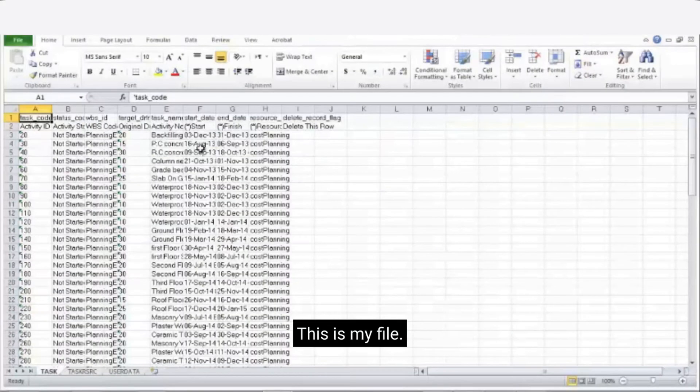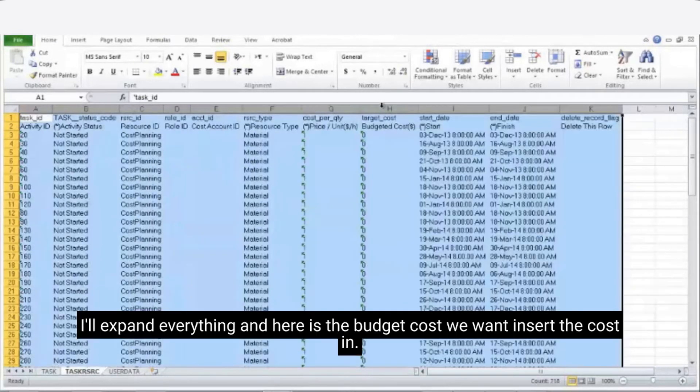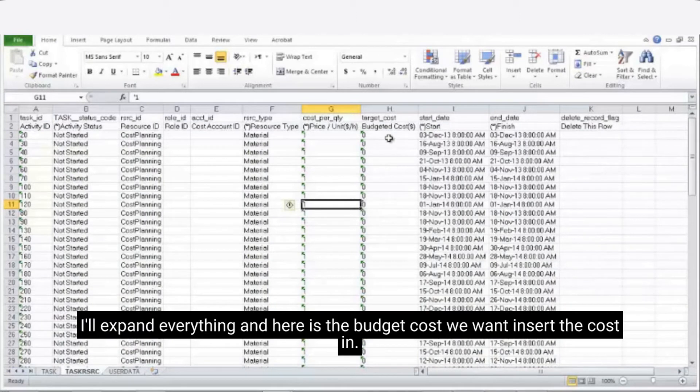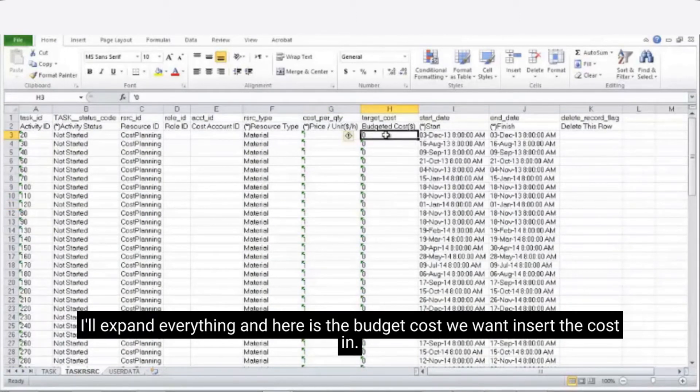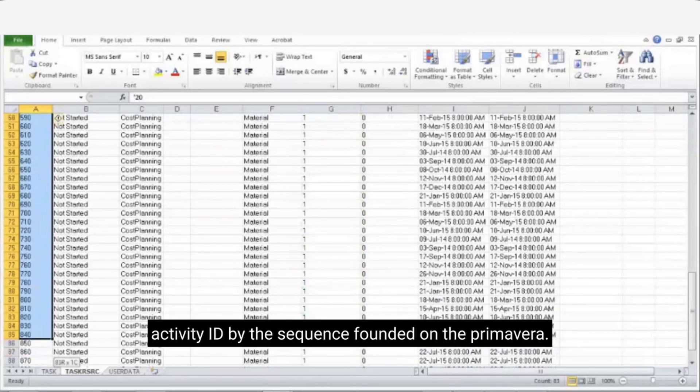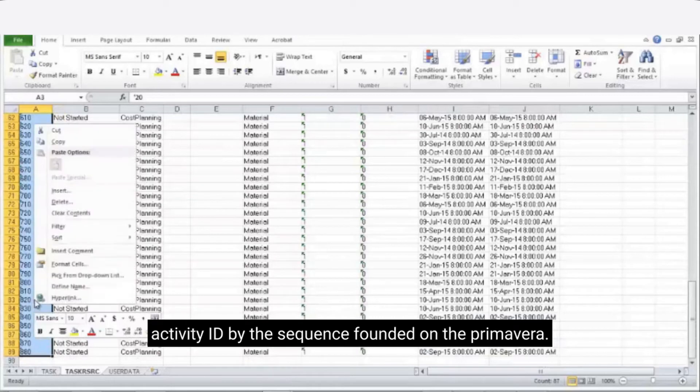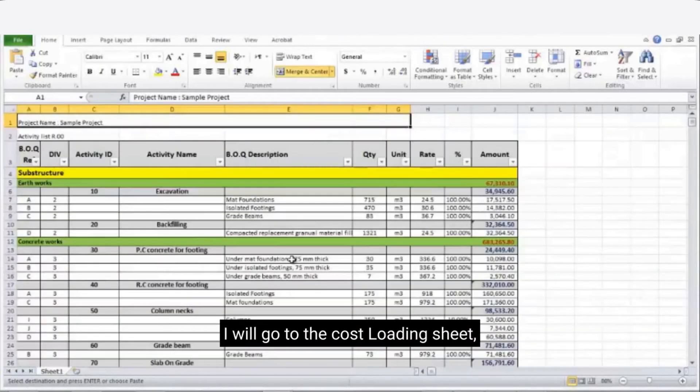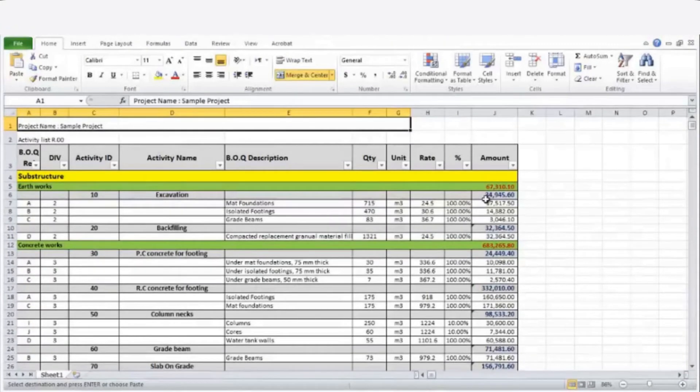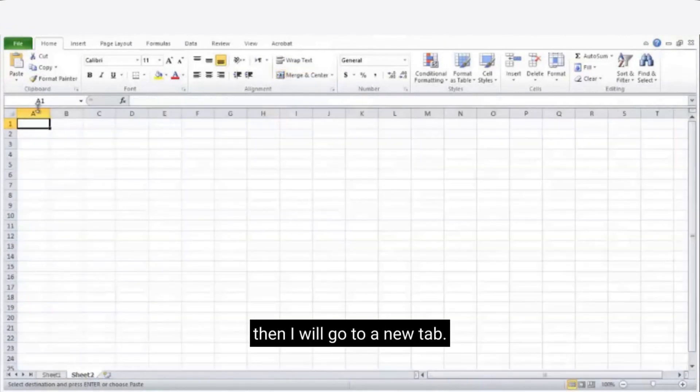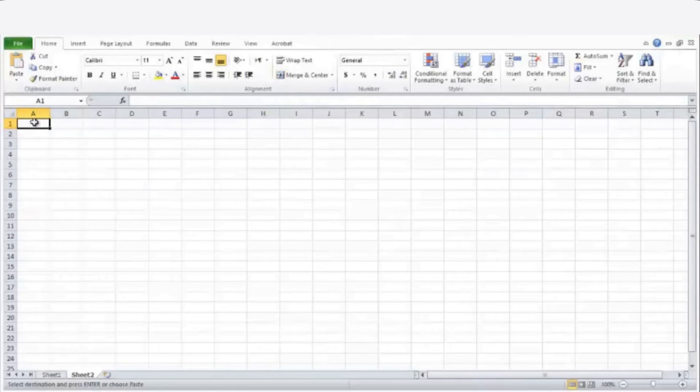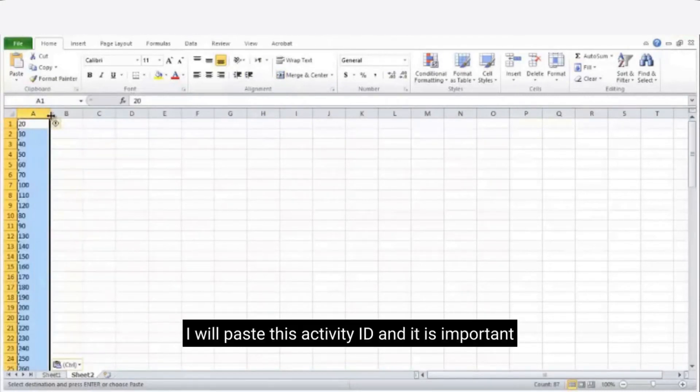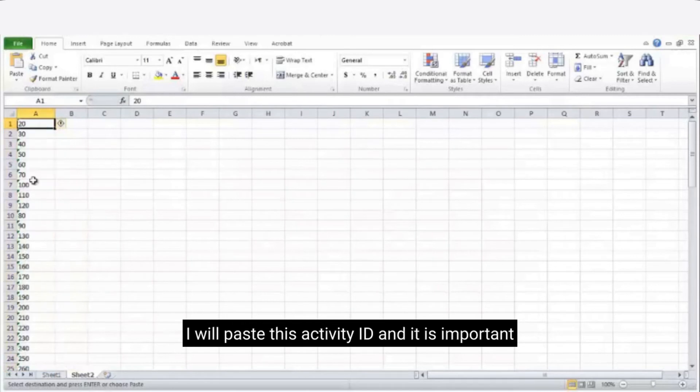So this is my file. I'll go to the second tab which is the resources. I'll expand the columns so I can see the budget cost where we want to insert our cost in. Now I'm going to copy this activity ID by the sequence found in the Primavera. I will go to the cost loading sheet. Then I will go to a new tab. And I will paste this activity ID. It is very important to convert this one from text to numbers.